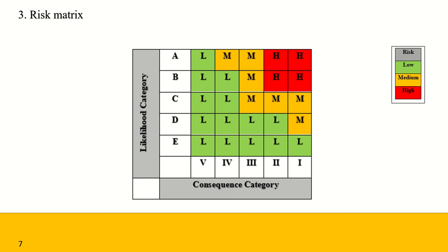A risk matrix is used to combine the likelihood and consequence rating to generate initial priorities for the risk. An example with three priority levels is shown here, including low, medium, and high risk levels. We use a five-point scale for consequence and likelihood in most circumstances, as they are simple to comprehend, easy to use in a workshop environment, and provide adequate discrimination.